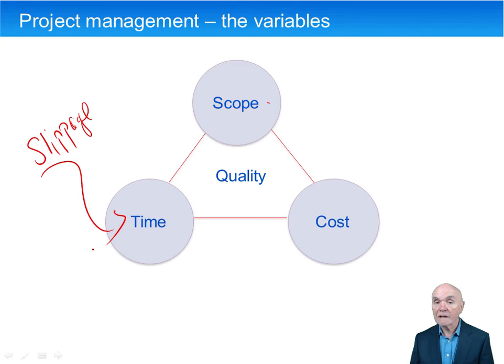And basically the options are as follows. You can let it take more time. Maybe time isn't that desperate here. You know, we hope to finish it by the end of March, but actually it won't really matter too much if it doesn't happen to the end of May. It's not something which is absolutely time critical, and that's in a way an easy solution.